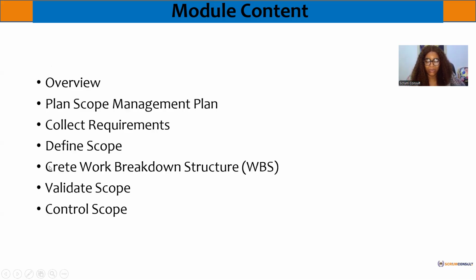In some cases, they will tell you that at the end of the project, a stakeholder rejected the output or the outcome of the project. What should you have done differently as a project manager? Were the deliverables validated by the stakeholder? Were they approved? Were they demonstrated to the stakeholder? Did the stakeholder understand the scope and approve it? Before you deliver, you don't just call them and deliver. So that is why you need to understand these processes one after the other.